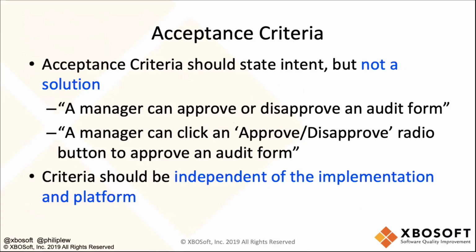One thing about acceptance criteria is that it is not a solution, but it is an intent. So if you look at this example here, on the first example, we have a manager can approve or disapprove an audit form. That's very clear. The next one actually steps into the implementation, which is not what we want to do. We want to have the criteria separate from the implementation.